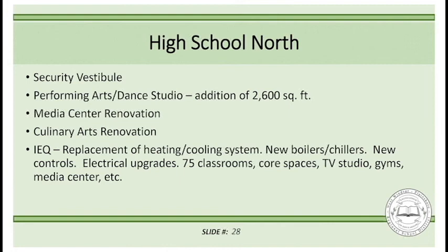For this work, the lead time on the units to be produced is something like a year and a half for the manufacturer, a year to a year and a half by the time it's authorized. This does not happen fast because the system has to be designed and it has to be specifically built based on the specifications. This is a big project.